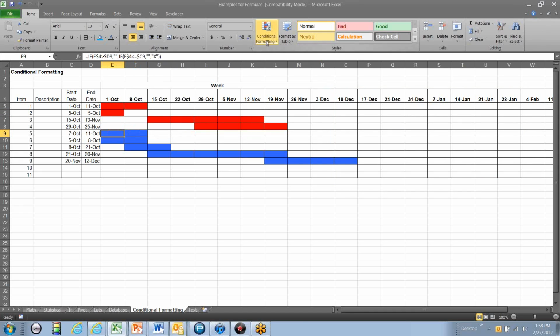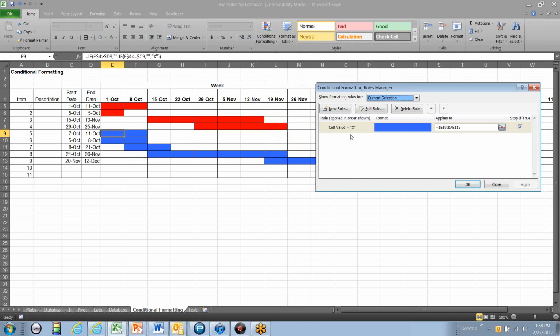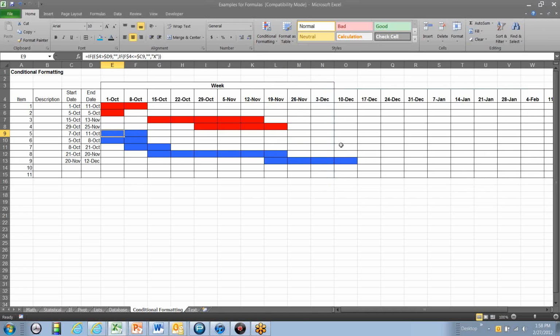These ones down here, the conditional format is blue. So again, if I go up to conditional formatting, manage rules, you can see I've set it to blue. And I can edit these rules. I can create new rules. Essentially, I just highlighted that range, and I gave it a conditional format to say if there's an X in that cell, go ahead and make this blue. It probably makes the text hidden, too. That's how it works, and it's a nice little way of making a Gantt chart. In fact, this Wyman project that I mentioned earlier, they actually use this formula that I created for them when they do their planning for their facility.